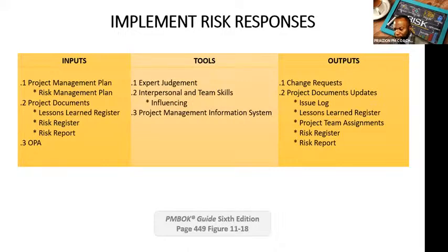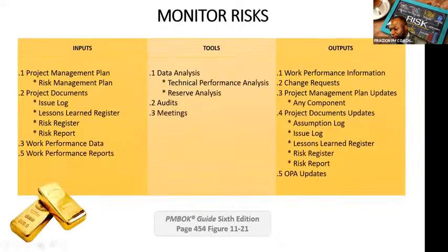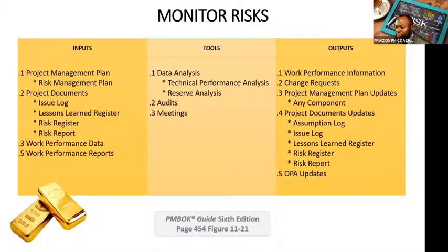Okay? And then going to our final one here, monitor risks. Monitor risk is a powerful process, folks. There's a lot going on here, but I just want to call out one, technical performance analysis. This is where you look at your technical milestones and say, did we achieve them? If you didn't get to functionality you said you would, that is a risk, because it could keep going that way and you're late.